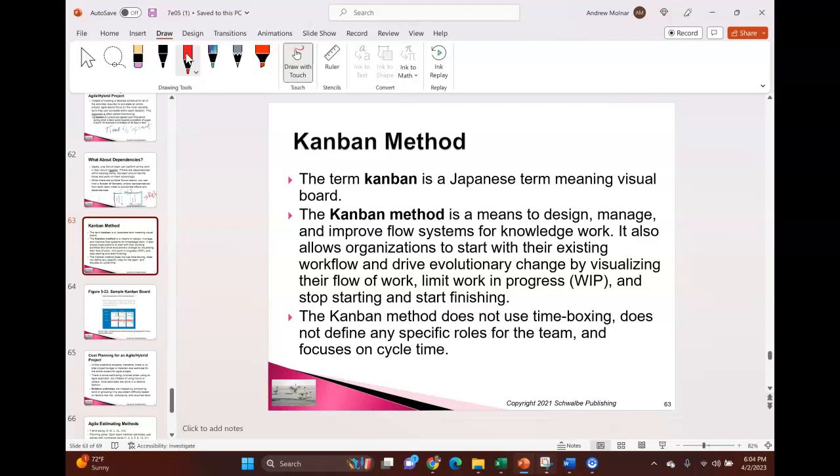Now, what I love about a Kanban board is I use 4 columns, and it's a pull system. When I have capacity, I'm going to pull the next work forward. The 4 columns are: work not started, work in progress, work that is escalated or has hit a wall and needs my attention or others, and then work done. And that's how I put my work here, and I pull stuff forward as I have capacity to work it.